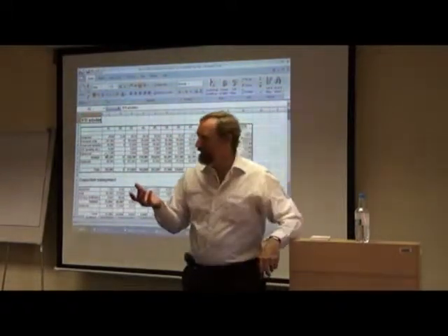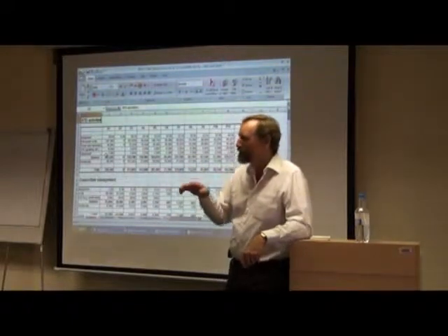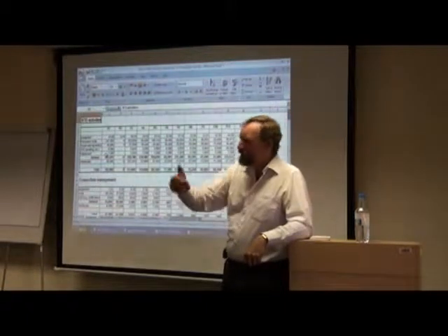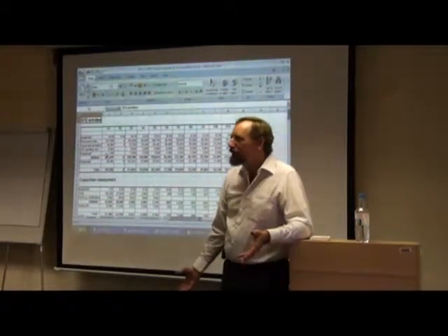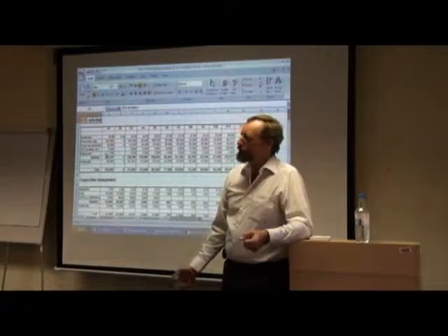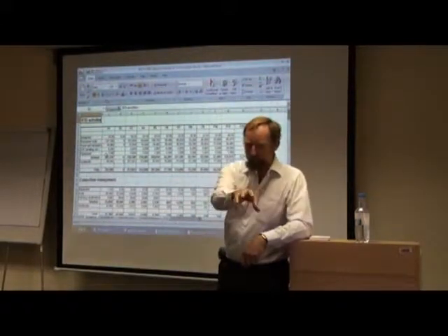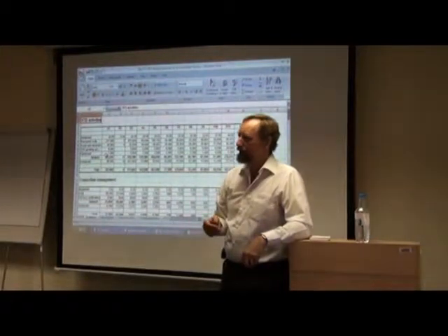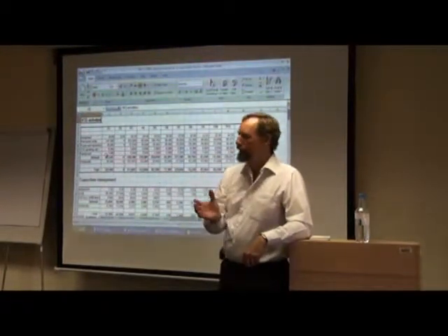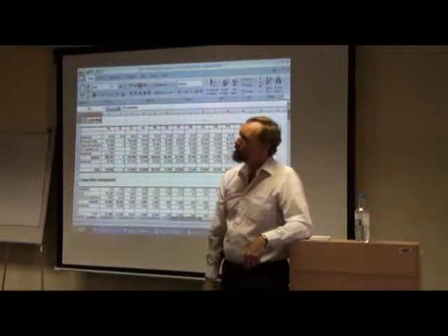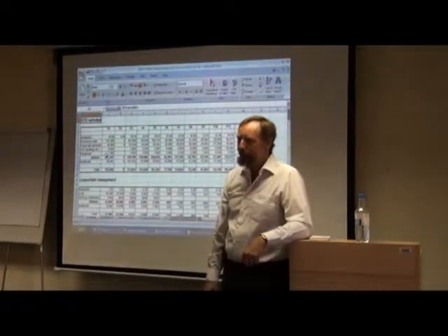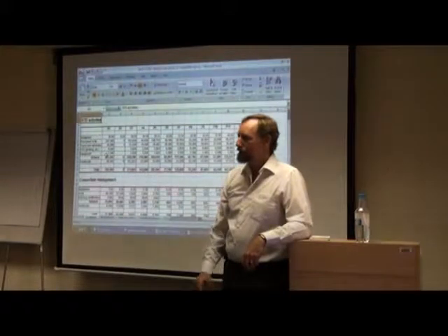No, the benefit is not there. The problem is that by accounting rules, you have to depreciate equipment. Almost every university has that rule. Yeah. Small equipment, smaller things like tabletop centrifuge, pipette tips, those kind of things are not depreciated. But what I'm saying is, there you have the full cost at once at the moment that you buy. If I have it in the budget, and for some reason I delay buying that until the 2nd year, then you get less refund. And less refund from who?